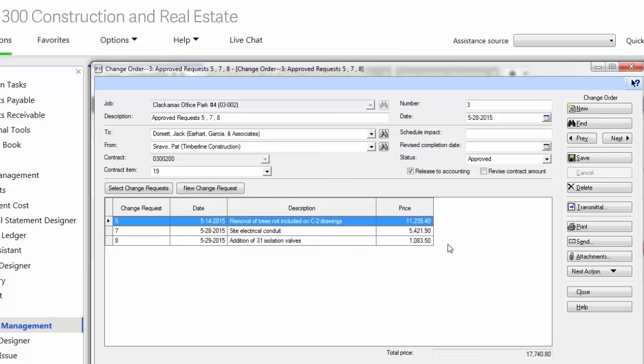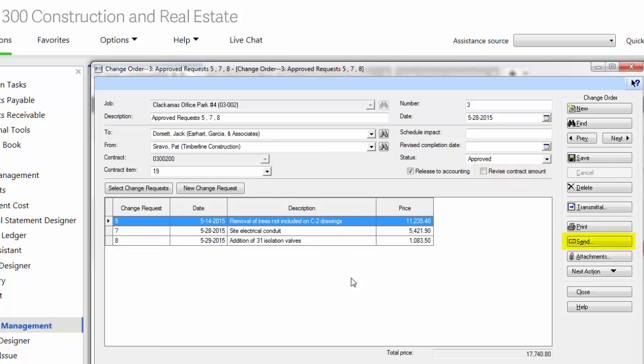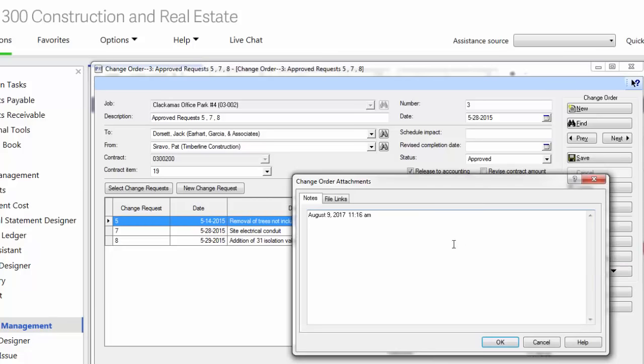In this case, this is going to impact our contract with Northwest Landscape. Now that the customer has given me a verbal approval, I can add it to a change order that they can then sign. I decide when I want the change order to adjust my contract amount or when I want it to update my job budget. Typical in the construction industry, we usually perform work on a job before actually receiving the signed change order. So I might want to update my budget before actually revising my contract amount.